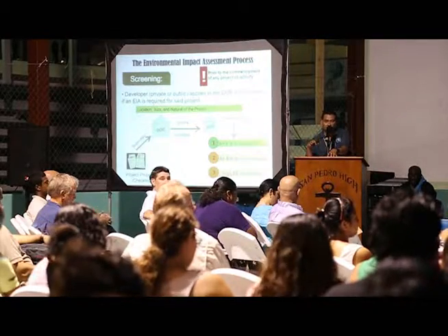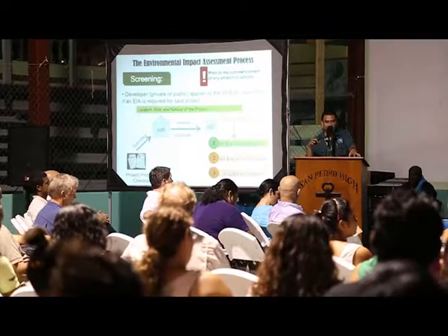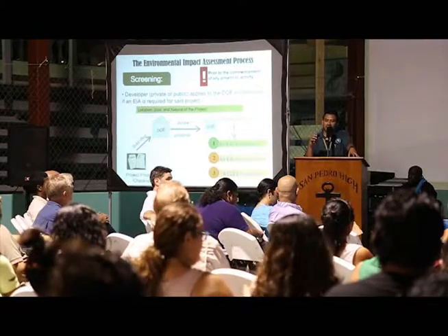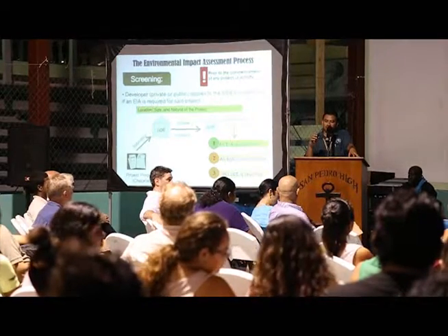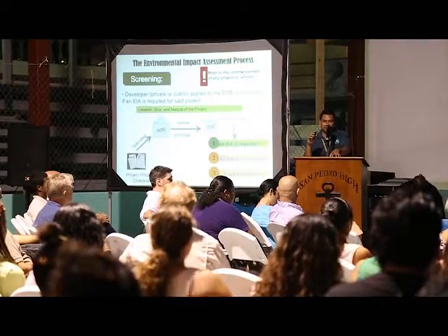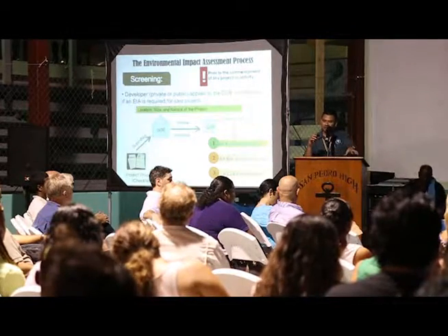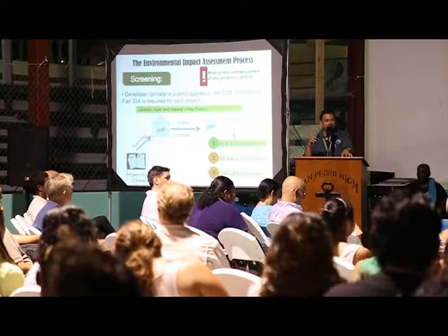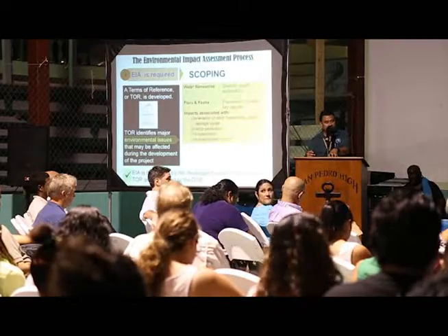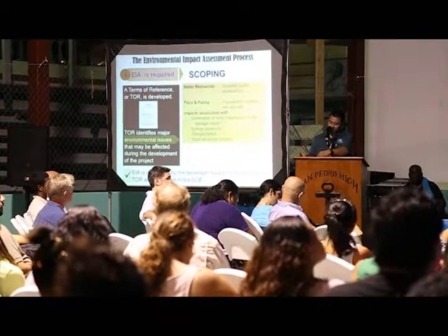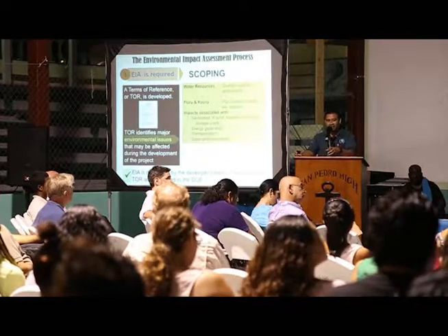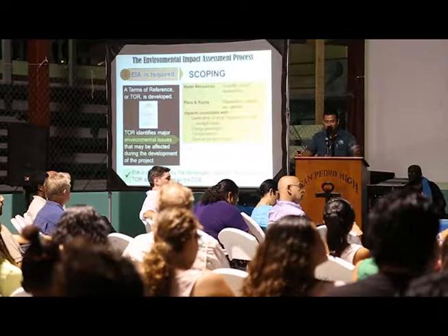Now as we continue with what the project at hand is, the Blackadore Key Island Restorative Project, they were required to do an EIA. True, and that was done in the screening process using established criteria and reference to our Schedule 1 and Schedule 2 of our Environmental Impact Assessment Regulations of 1995, as was amended in 2007. And as I mentioned, because we required an EIA, we had to go through the scoping. So the difference between the LLES and the EIA is what is done in this scoping exercise.